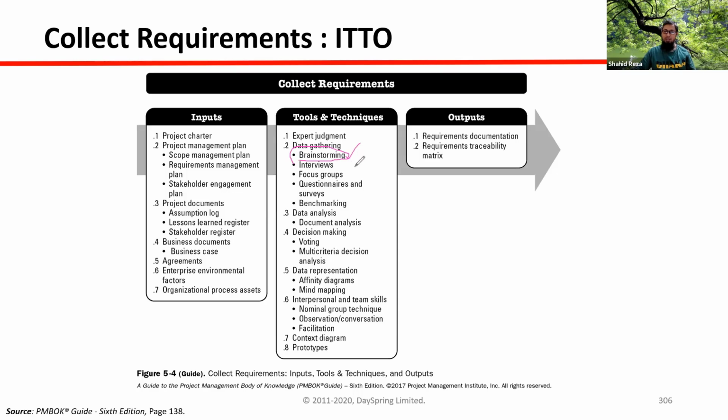So brainstorming plus prioritization of those ideas is known as NGT. Brainstorming is only generating ideas and collecting them. But in nominal group technique, we have brainstormed, then we prioritize depending on importance, fitness, and other criteria. We try to prioritize the ideas. That is known as the nominal group technique tool. So this tool we can also use.